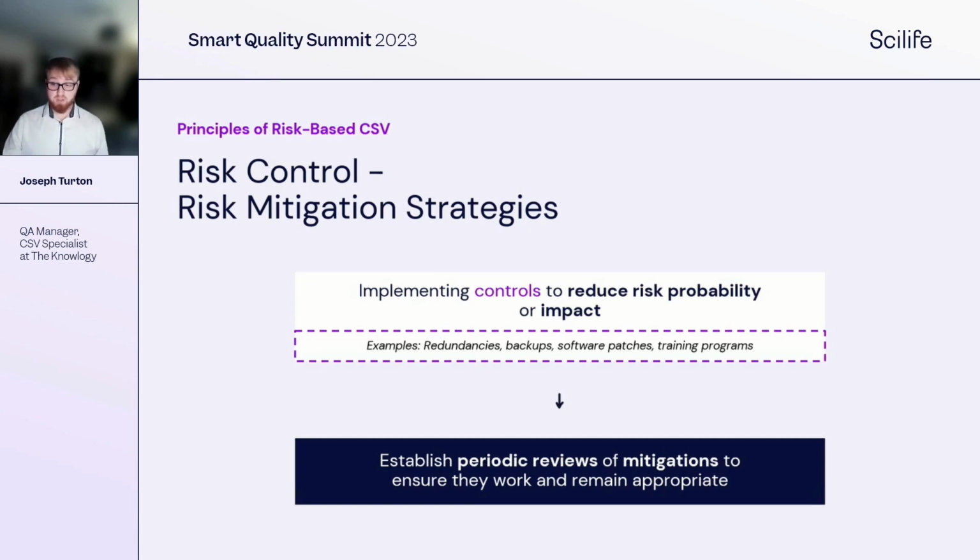The key to a good risk control is continuously checking and understanding if your mitigation strategies are working, whether they're practical and fit for purpose. Regular reviews of mitigations allow you to understand if they're becoming impractical as your business changes. Say your business is going through more studies or more trials than ever. The mitigation strategies that you put into place when you were a smaller organisation might not be appropriate anymore. So the reviews give you scope to change them.